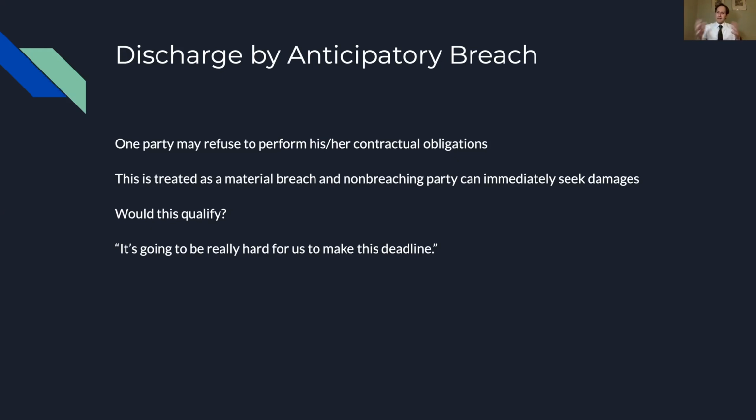Does that qualify as anticipatory breach? And you should probably be shaking your head saying, no, it's still possible for the other party, for you in this case, to get me the cookies by 4 o'clock, the allotted time. So again, if you call me at 3 or at 2 and say it's going to be really difficult, I can't claim breach and hire somebody else. I have to wait until, and this is tough, right? You have to wait until it's a sure thing that the other party is going to breach and then claim breach and move on. Okay, so anyway, that's anticipatory breach for you.